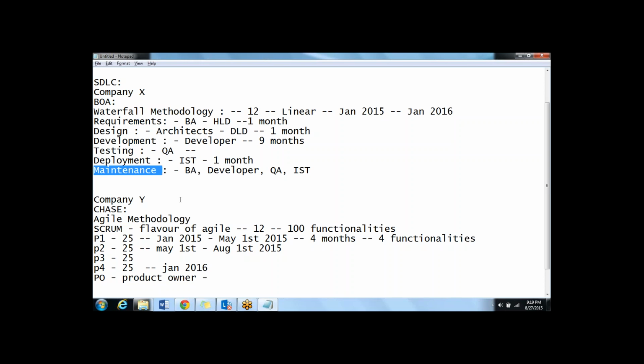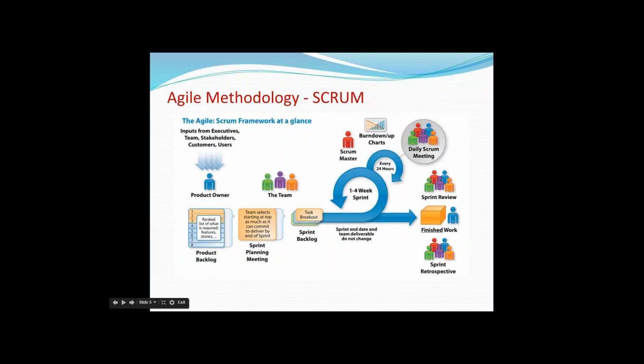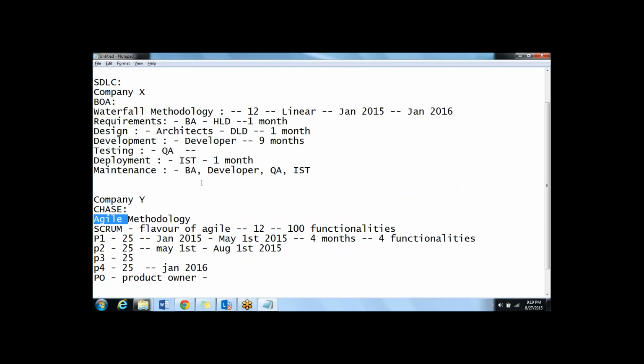But if you are following an agile methodology, the end client, which is nothing but the Chase Bank, we give a demo to the end client every 2 weeks based on what exactly is the work that we are doing. If the Chase Bank likes it, well and good. If it says that it did not like it, and there are certain things which need to be reviewed, then you go ahead and make those changes in the next sprint, and again demo it to the end client after 2 weeks, which means the Chase Bank knows what exactly is being developed. Now, based on this understanding, can someone tell me which one is better or preferable, waterfall or agile?